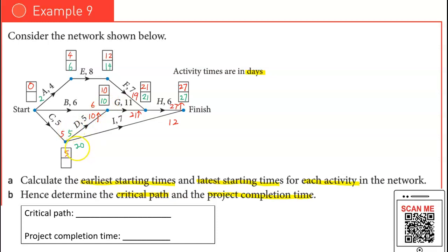Right, so between these two, which one is the smaller value? Go for the smaller value and bring it down here as 5. Okay, so now let's look at 10. 10 minus 6 is 4. And 5 minus 5 is 0. So between these three values, 2, 4, and 0, the smallest obviously is 0.